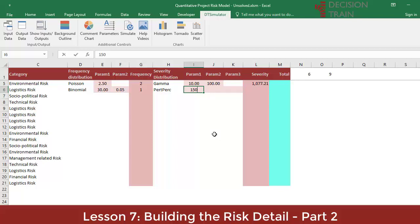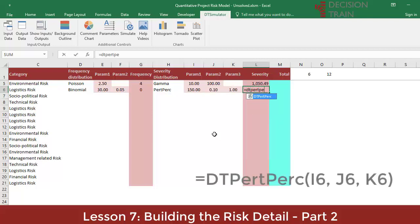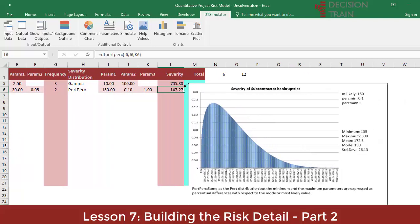Write 150 as your first parameter in H6 — this is the most likely value or mode. Then in the two adjoining cells type 0.10 and 1.0. This means this is a PERT with a most likely value of 150, with a minimum value of 150 minus 10%, that is 135, and with a maximum value of 300 — 150 plus 100%.